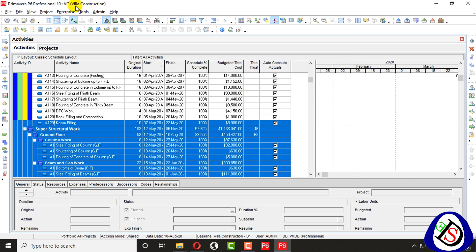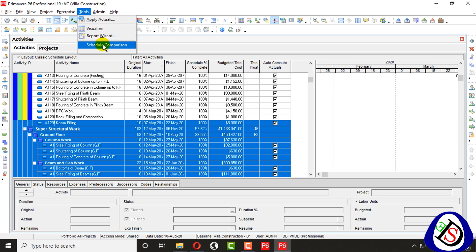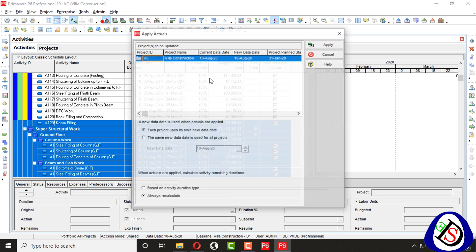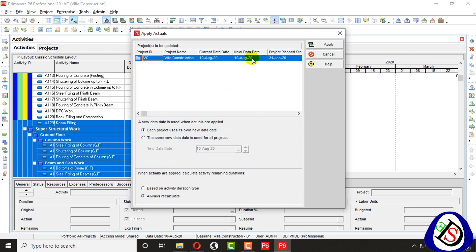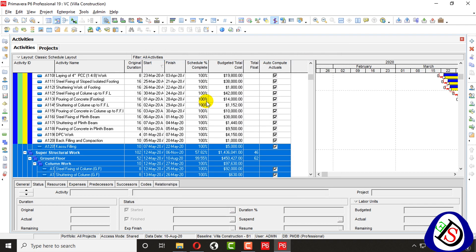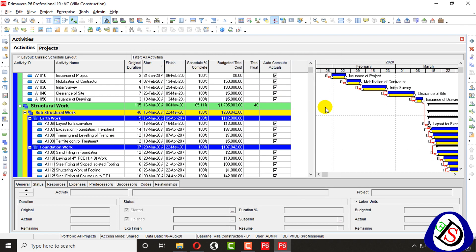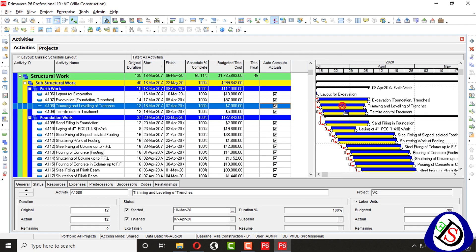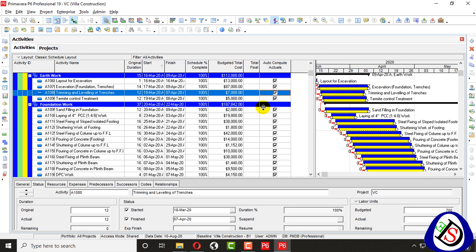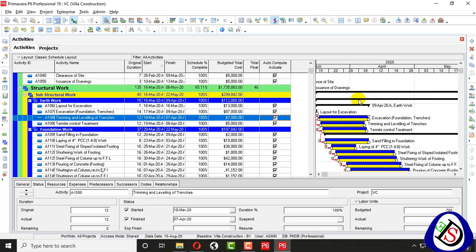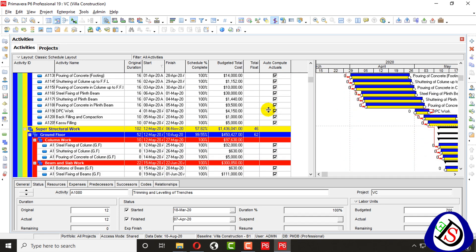When I go there again and Apply Actuals, you can see the new data date is now 10th of August. All the progress is now updated automatically.